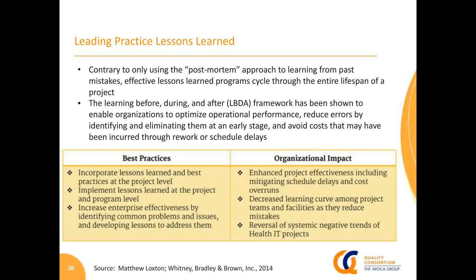And in fact, by sometimes investing more cost from a risk standpoint, you actually reduce overall cost for the entire program, because rescue missions or last-minute fixes are usually more costly than what a proactive risk solution would have cost in the first place. So if your enrollment, as an example, is 40% behind on a pivotal registration trial that's on the critical path, the last-minute efforts to get the enrollment up are almost always going to be more costly and less effective than what would have been done proactively.